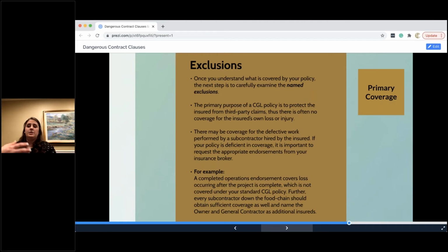But the insurance policy, so pursuant to the contract, the subcontractor had an insurance policy, but it did not cover defective work. It only covered damages as a result of this defective work. And so the problem here is when my client then had to go back in and take out and redo all of the HVAC, lift the roof, all of that, none of that was covered by the insurance. What was covered is the cleaning of the surgical rooms, trying to get fiberglass out, any damage that may have been done to medical equipment, any leaking that may have happened, that was covered. But that may have been 10 to 20% of the damages incurred by my client.